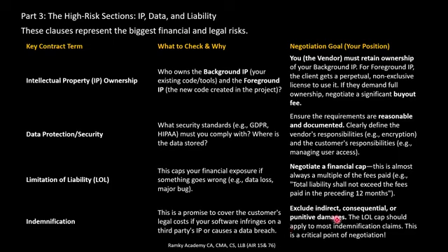So we need both parties to indemnify each other in order to protect. This loss of indemnification should be capped under limitation of liability. Any kind of liability in the overall contract should be limited to 12 months' fee payable. So the same LOL cap should apply to most indemnified claims here. This is always negotiable and depends upon the critical negotiation points.